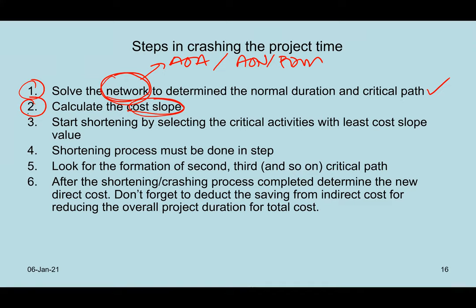Number three, start shortening by selecting the critical activity. The keyword here is critical activities. Why critical activities? You have to remember, critical activities are the ones that determine the overall project duration.